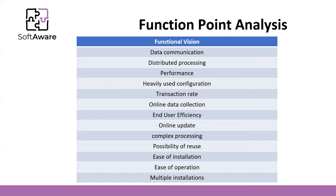In the function point analysis, we must rate the following system characteristics: data communication, distributed processing, performance, heavily used configuration, transaction rate, online data collection, user efficiency, online update, complex processing, possibility of reuse, ease of installation, ease of preparation, and multiple installations. We must rate each one from 0, not present, to 15, strongly present.